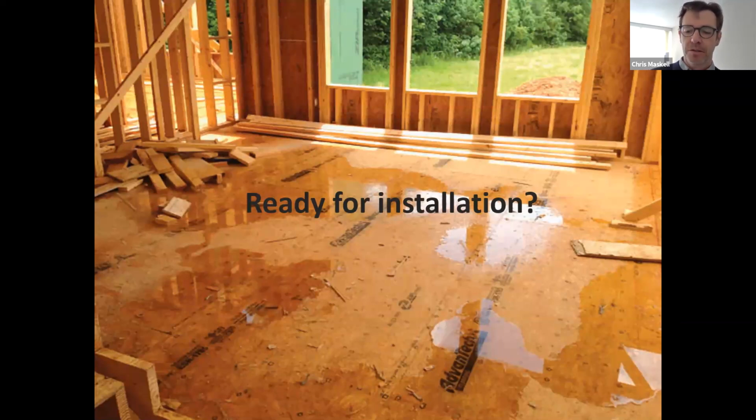Why would a builder ask you to install early? Probably because they're looking to get a draw from the owner who's building the house so that they can keep paying their trades and move forward. It makes it look like they're getting progress when the floor's down, even though the floor is not supposed to be down early on. Timing is everything in love, war, and floor coverings, folks.